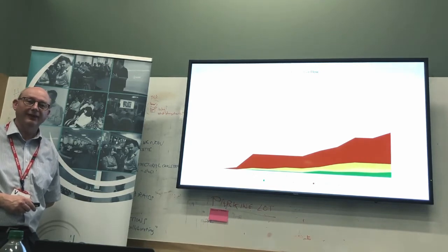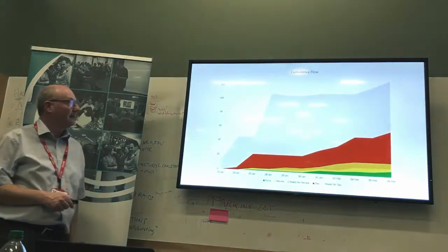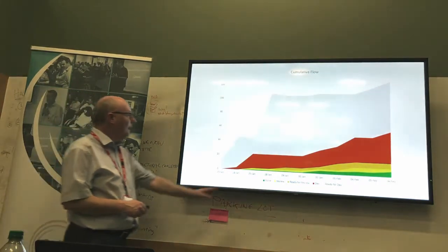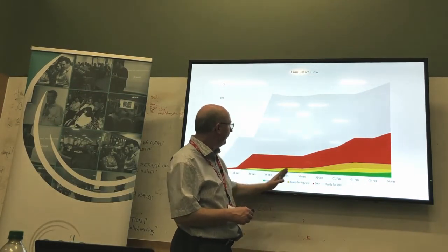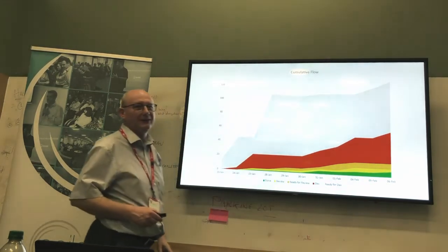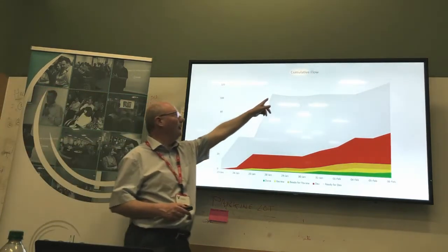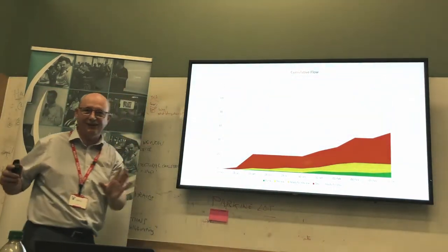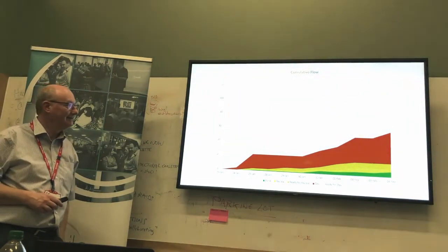Interesting. So they got the sprint backlog in place by day 4. But this is still a very bad point. They ramped up a bit, but they didn't really take off. Was it because they rushed at it and they've not got it in good shape? Yeah, I think so. They probably had stories there, they've written a whole load of stories, but that doesn't mean they're refined and ready to go. And the lack of refinement ended up causing a bit of a car crash at the end, really.